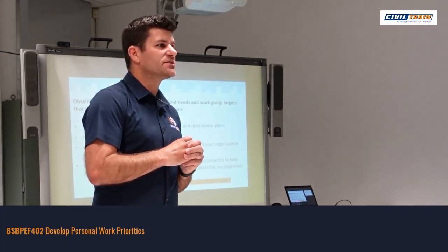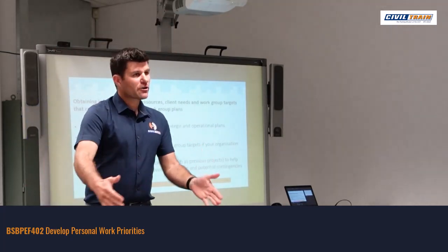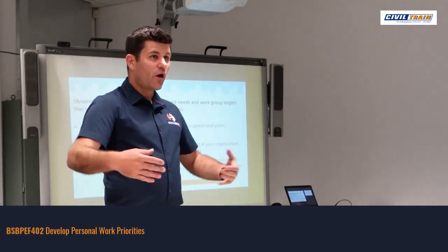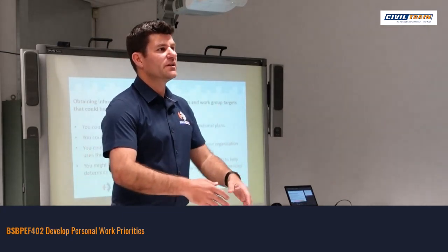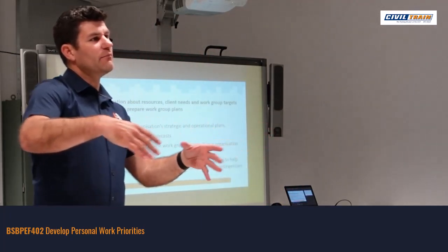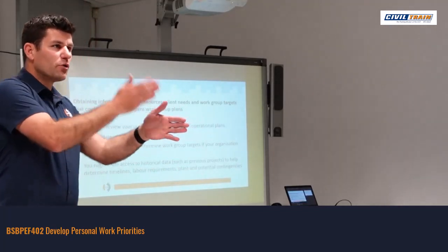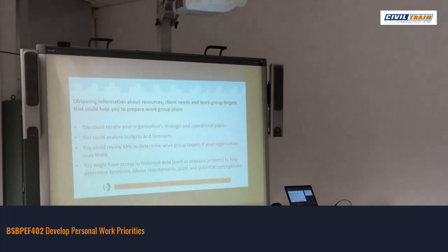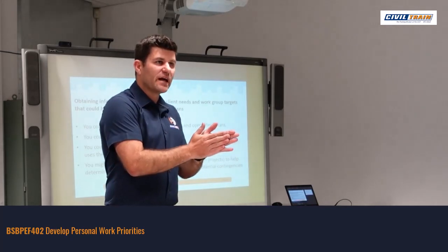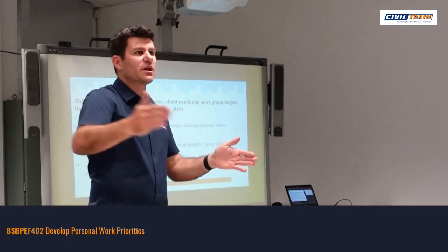And what I mean by dependency is that if I was to say that we're creating a concrete slab on the ground, you start thinking about the steps involved to do that. It might be initial set out, excavation works, formwork, the Forticon plastic, the reinforcement, and you go through all the steps that you need to do to get to that finished product. So in a logical sequence, most of the time in your job role you've done that many times, the activities that are required. So naturally in your head you're putting that sequence in place.